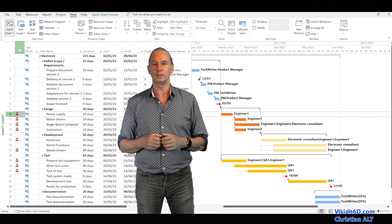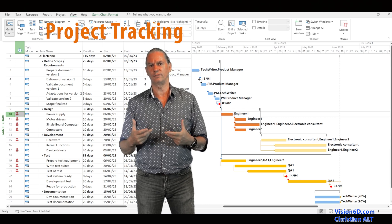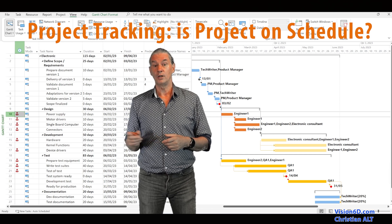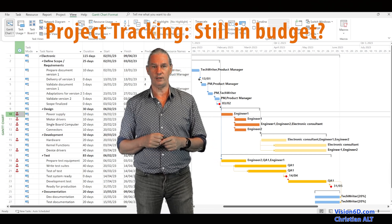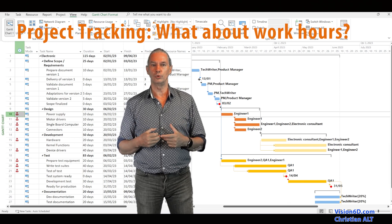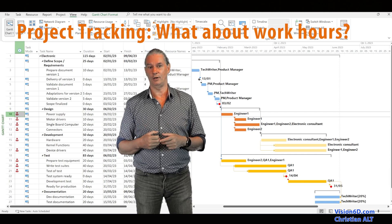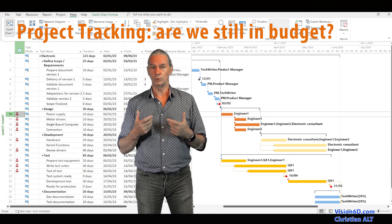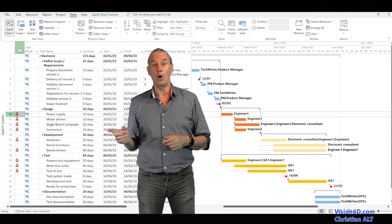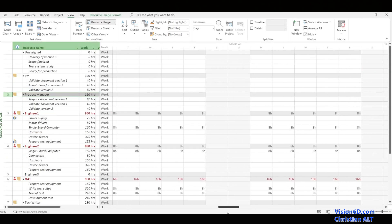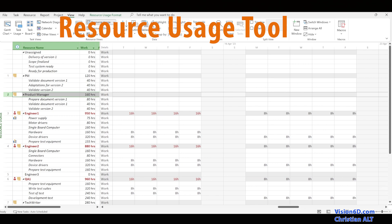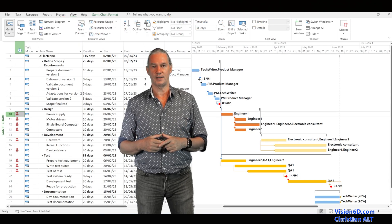If you want to do a tracking and follow-up on this project, you need to have removed all those over-allocations in order to baseline the project and do the correct follow-up. So I'm going to show you how we solve those more complex over-allocation issues, using the resource usage diagram that MS Project provides us as a tool.